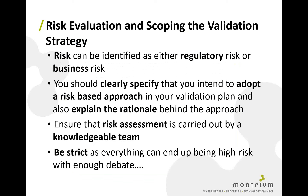Risk is not only regulatory — it can also be business risk, so your ability to run your business is important and must be taken into account. When using a risk-based approach, we need to clearly specify this within our validation plan and explain the rationale. It's very important that a knowledgeable team — composed of technical, operational, quality, and regulatory individuals — performs the risk assessment exercise. A good moderator is also important, because with enough debate, everything becomes high risk, and we have to be pragmatic and properly document the outcome.